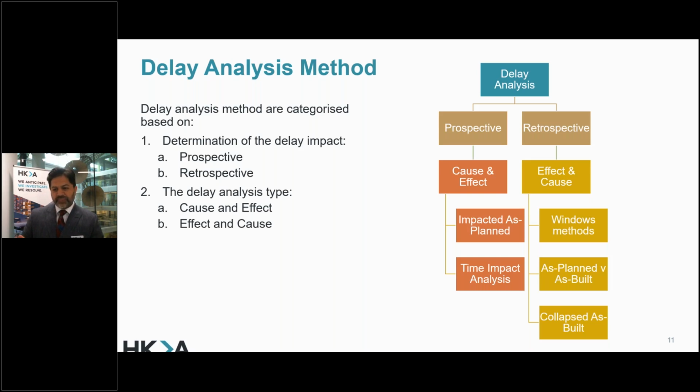But when you see the prospective element, your project hasn't finished, you are impacting the program, whatever impact or delay it has caused, you are identifying the critical path. And through the critical path, you're looking at, right, we are on 1st of November today, but because of those delays that happened between January and March, we've looked at the causation of those delays. We know there is a 3 months delay during that period, but the project will now finish not in January because of the 3 months delay. It could finish in February because of various reasons, because you can't work in winter hours, or there is a productivity loss,